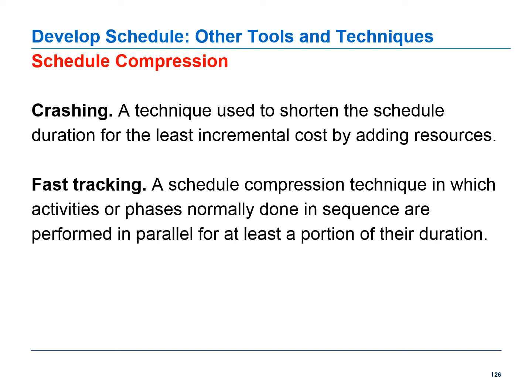Crashing works only for activities on the critical path where additional resources will shorten the activity's duration. Crashing does not always produce a viable alternative and may result in increased risk and cost.